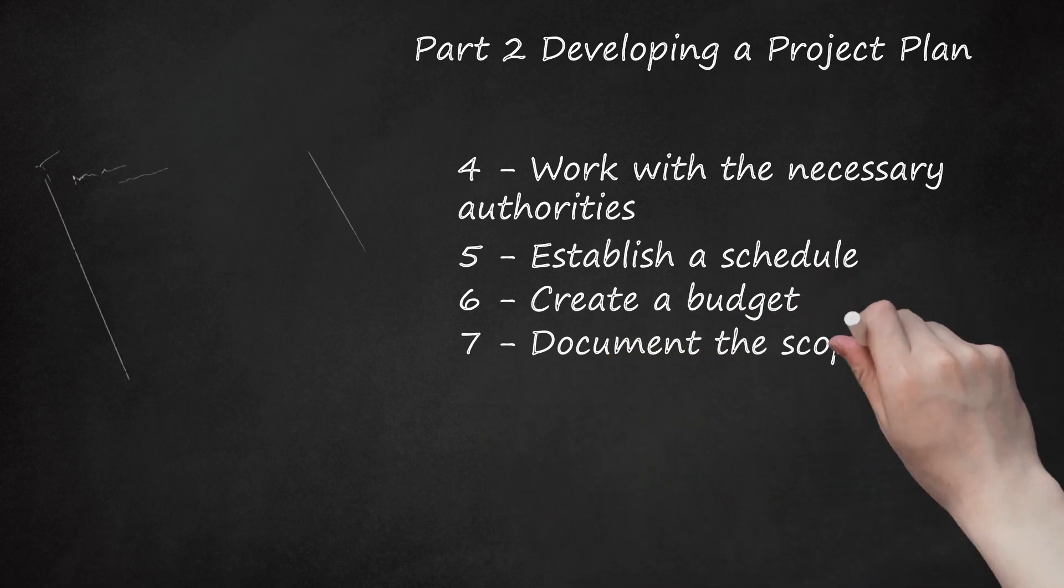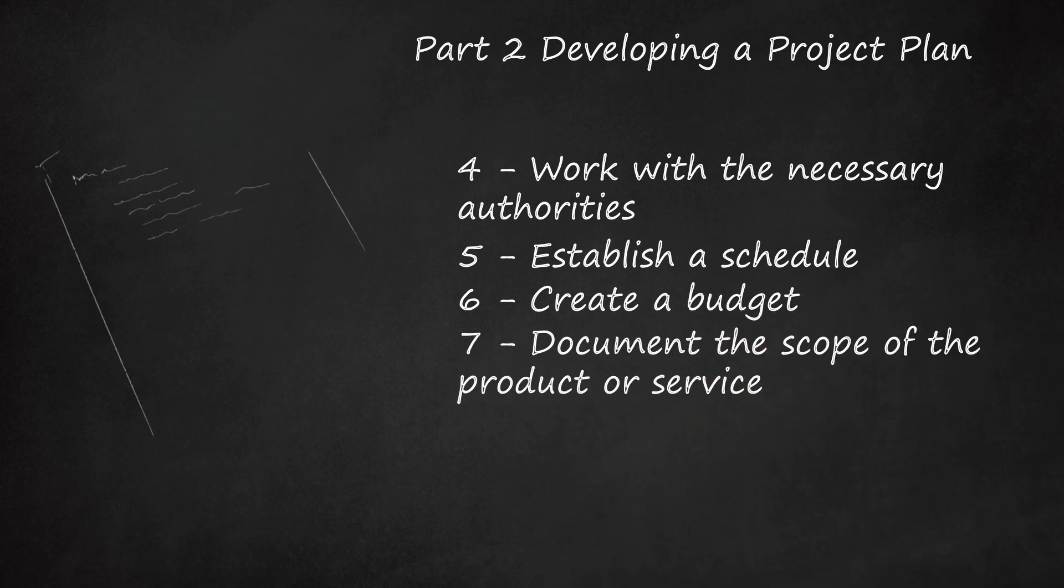Step 7: Document the Scope of the Product or Service. Develop a detailed description of what the product or service will be. You can work with the design team to come up with this description. It should include deliverables, resources, the schedule, and costs.